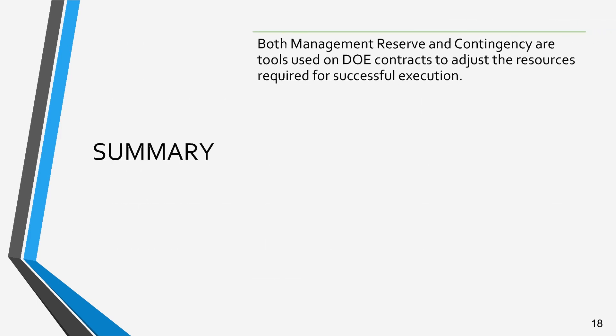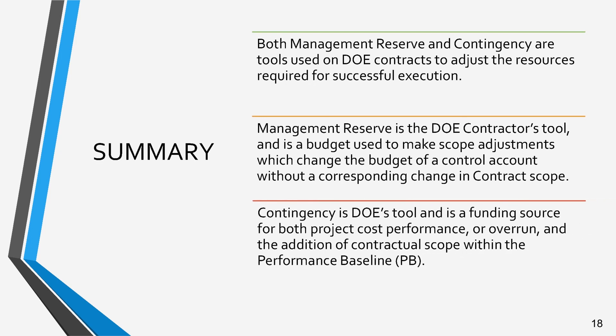In summary, both MR and contingency are tools used to adjust the resources as the project proceeds based on new information. They are required for successful execution of the performance baseline. MR is considered the contractor's tool in that it is a budget reserve set aside for contractor management use. The MR can be applied due to unexpected growth within the currently authorized work scope, rate changes, risk handling, and other project unknowns.